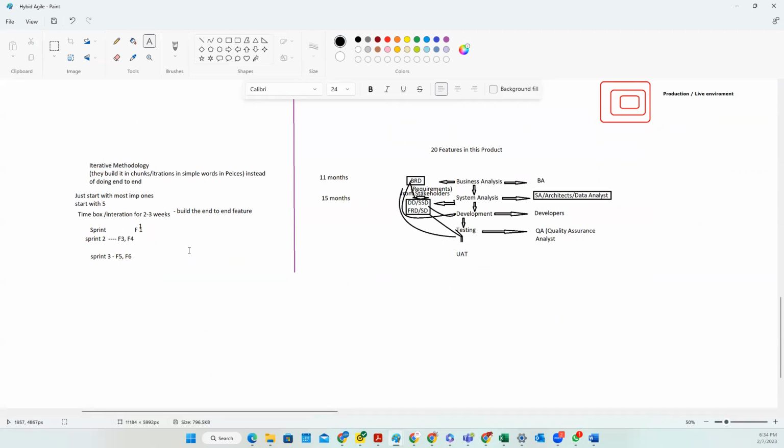After the first sprint, it can go online. Yes, there will maybe be just two or three products that they will be selling online, but those would be the most in-demand products, or the most in-demand services or features that the business offers. And every other week they keep adding. So that means they will start getting value since the very beginning.